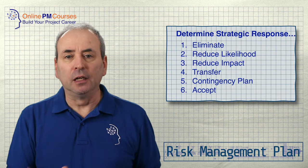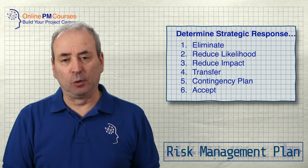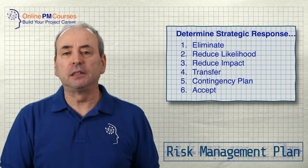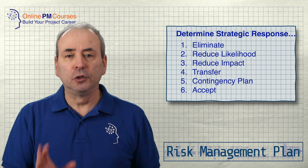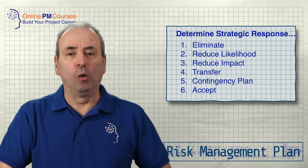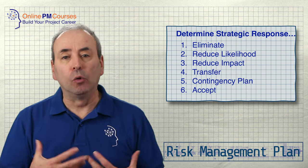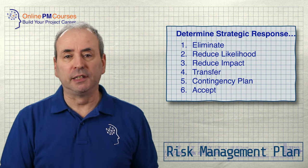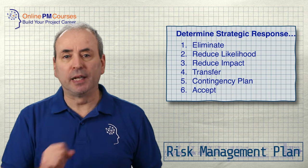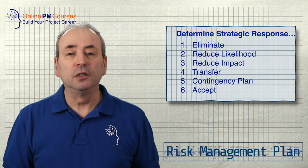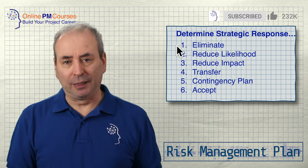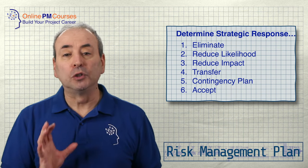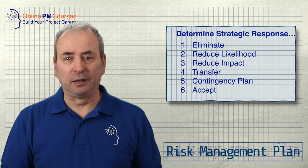For big risks you're going to want to combine two, three or even more strategic approaches in your response. Those strategic responses are: to eliminate the risk, to reduce its likelihood, to reduce its impact, to transfer the risk, to build a contingency plan, or to accept the risk and do nothing.